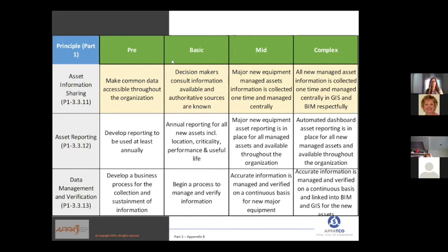Same thing as we add new equipment into our system. We don't have a COBie environment. We have an Excel document that we have folks upload. The contractor uploads, and then that gets pushed into our CMMS system, FAMIS.